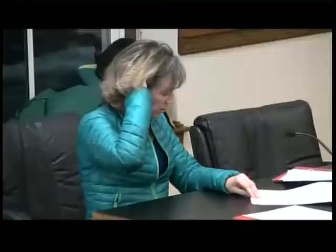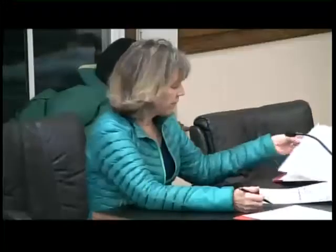Requirement, I guess the next thing would be the determination of a bond. The planning board has a $40,000 bond. They also have the majority of the site in their jurisdiction. Only portions of the site are in our jurisdiction, so based on some other projects and things we've permitted in the past, I set this one at 30. Now, granted, you've had bonds up to 120,000, I think, was Merrimack condominiums. That's a project that's built right on the wetland. This project does maintain a 50-foot no-build zone and a 25-foot no-disturb zone, but again, that's at your discretion.